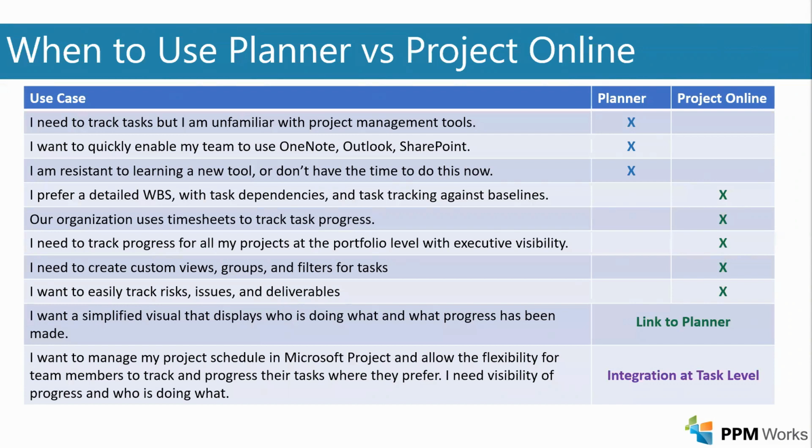And that just allows you to have access to the plan that's associated with the task that you select on the project itself. And then finally, the much higher level integration, the full integration between Planner and Project Online, is an add-in that we at PPM Works leverage. And that would be a scenario if you want to manage the project schedule in Microsoft Project and allow the flexibility for the team members to track and progress their tasks where they prefer. So that gives them the option to work in Planner, have a much more simple tool where you as the project manager can really just manage the project in a much more granular level.